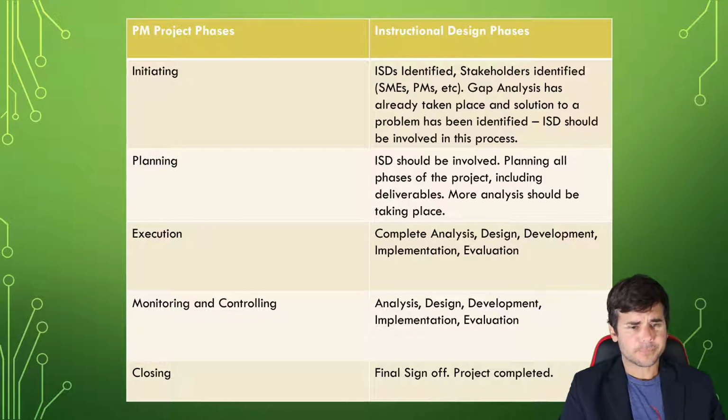All right, so how does instructional design relate to this and where does it fit in? In initiating, which is our first phase in project management, our instructional designers should definitely be identified. All stakeholders should be identified at this point: our SMEs, our project managers, everyone that's going to work on the project. A gap analysis, or some kind of front-end analysis, has been completed, because we're talking about initiating a project. So we had to have had some kind of problem, some kind of intervention is happening.